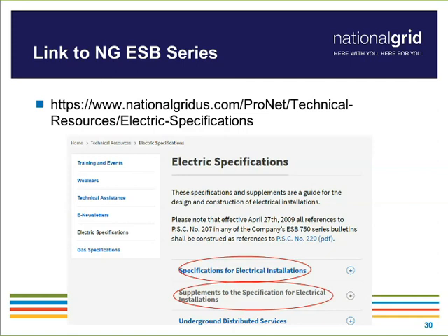So as you can see, we've gone through quite a few steps in a very short period of time. We went through the initial site visit where it's really just more than a payment. You also need that site plan. You need the site staked. And if there's any revisions, such as the generator size, we need some additional documentation revised. Then when we went into the design and creating the final schedule, we got into a little bit more details with the pole arrangement drawing, the final locations of the poles staked out in the field, and then a revised site plan showing where everything's going to be, and it was agreed upon.